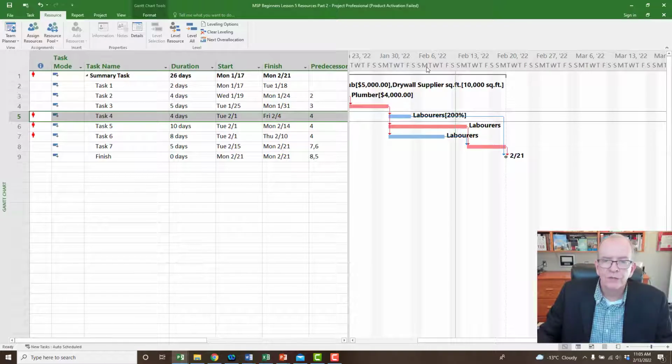If you go much below 50-55%, that cuts off the days. So I can see very clearly, I can see 6 working days of float. I can see the weekends in there, and I can see 6 working days of float.